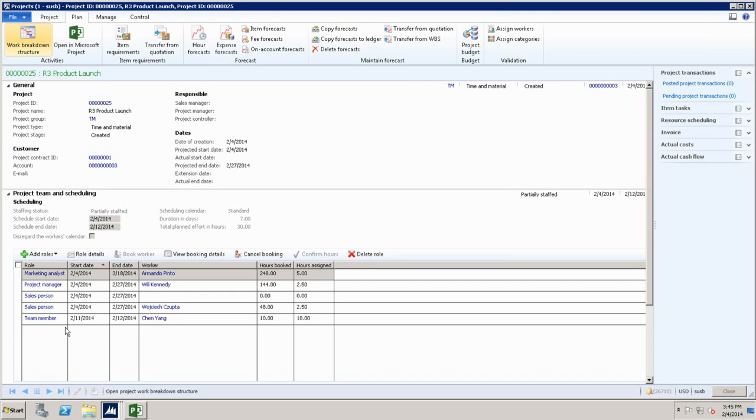So when you have a template with the effort hours, when you instantiate it, you will see that the number of hours for that category has been added there. Which is only for resources, also for items. Yeah, hours. So any transaction type that you can capture, it was in a couple of demos yesterday, but we can drill down into that. But yes, you can estimate it, you can save it in the template, and then when you create a project off of that template, you will see those estimates being generated for you.